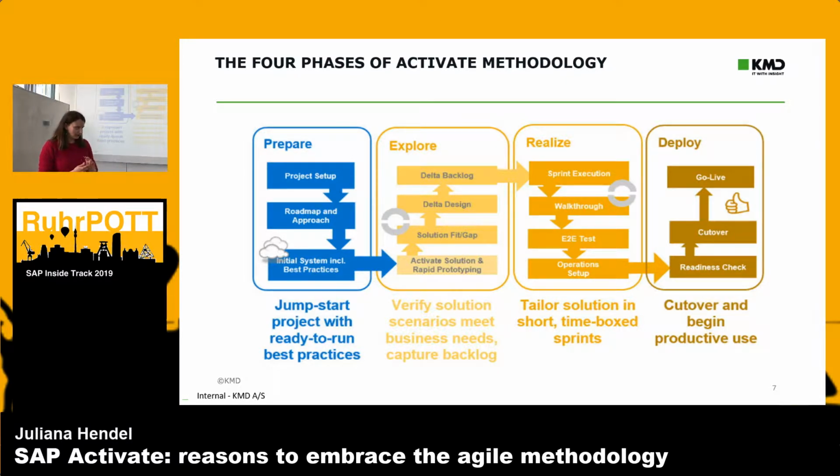So just to make it clear, gaps are those missing functionalities in our solution, whereas delta is the difference between where you are and where you want to be. Delta design means you will be designing for those gaps. You will create designs for those gaps, and you will document that again in the backlog document.